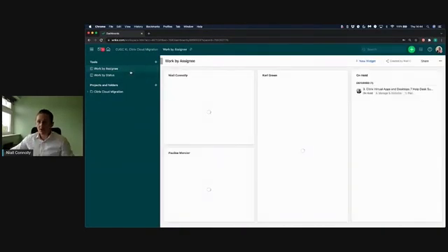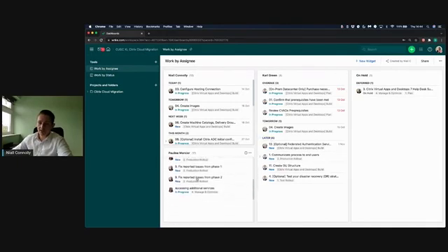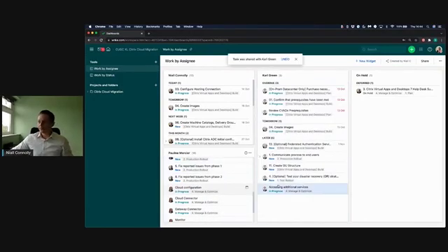and we can also do it by work by assignee. So still looking at the dashboard point of view, you can see what's today, what I have to work on, what Pauline, colleague, and Carol have to work on. But we can see there's probably too many tasks assigned to Pauline, so we can simply just drag and drop, and I'll reassign that. So that automatically reassigns it to Carol.